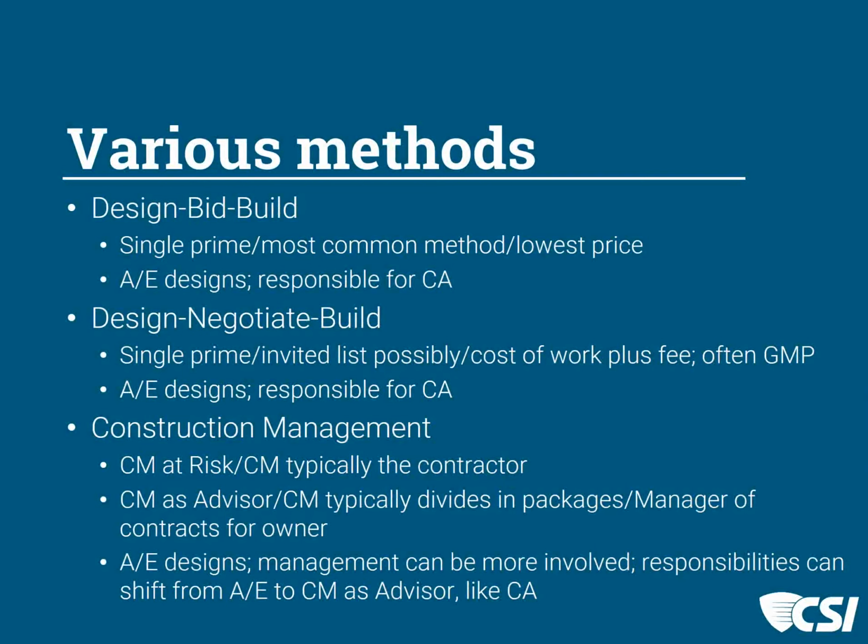And in this model, our involvement as designers is that we are responsible for the construction administration, so that we administer the construction contract for the owner during the period of construction. Because budgets are what they are around the country and times are difficult, we in North Carolina have started to expand our horizons as far as public-owned projects and the delivery method. Another is design, negotiate, build, where we have created an invited list, possibly, for single prime contractors to bid.